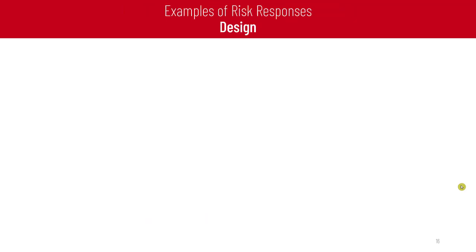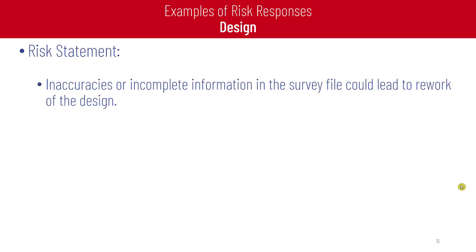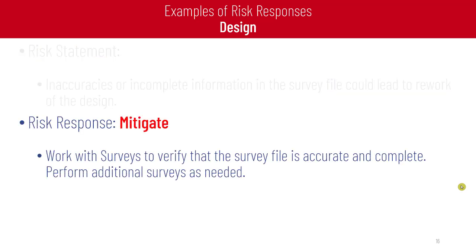Let's show some examples of risk responses in the design phase. First, the statement stated that inaccuracies or incomplete information in the survey file could lead to rework of the design. The risk response recommended is mitigate.